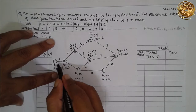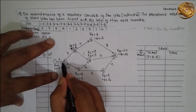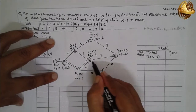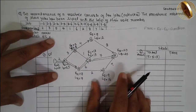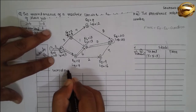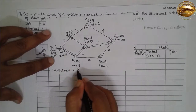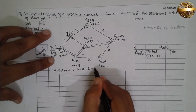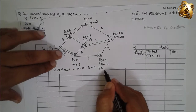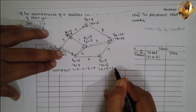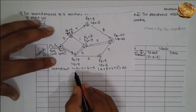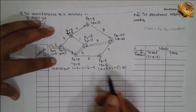Now see the critical path. Where E equals L: node 1 (0,0), node 2 (2,2), node 4 (7,7), node 6 (13,13). The critical path is 1→2→4→6→8.